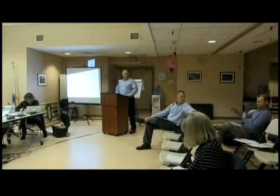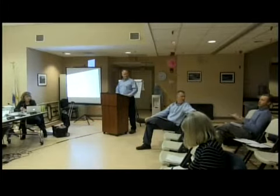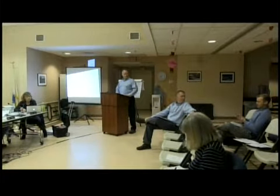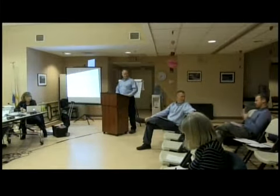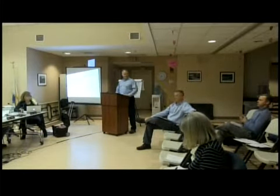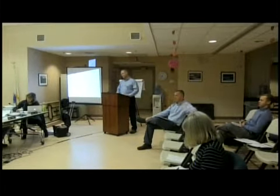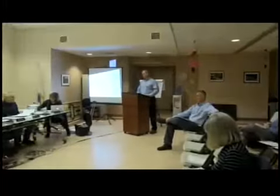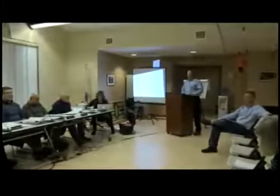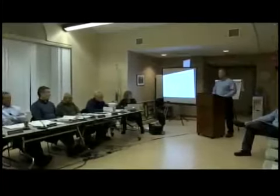Springtime is always our crunch time. We need to collect bids, recommend an award to the city, and then submit a grant by May 1st. Then the FAA has to do their processing and get the paperwork in order. We usually start construction in late summer, so hopefully August, maybe the 1st of September. But the order of conditions is key for the actual bid package that goes out. So, the March meeting, OOC, in an ideal situation.